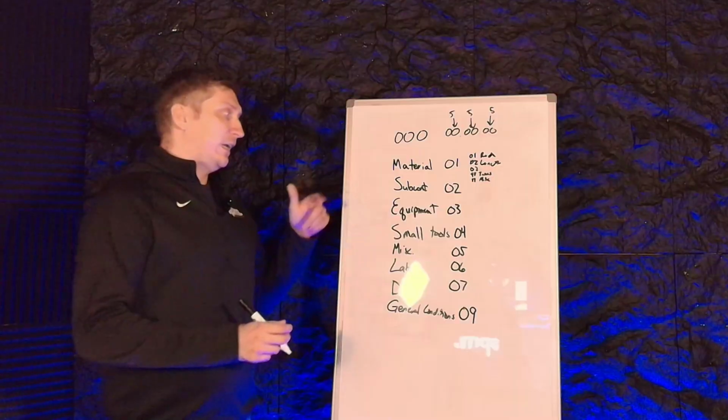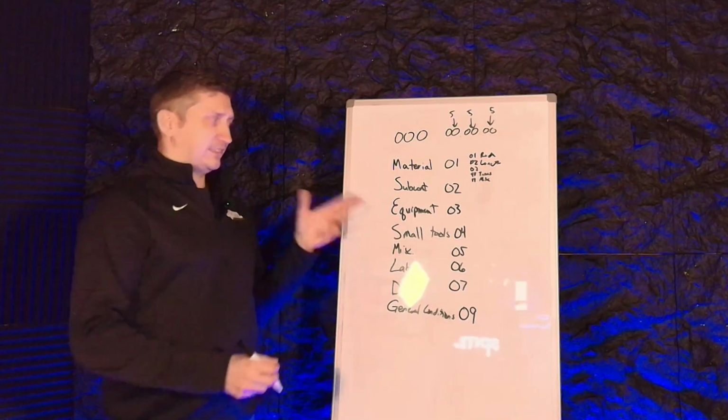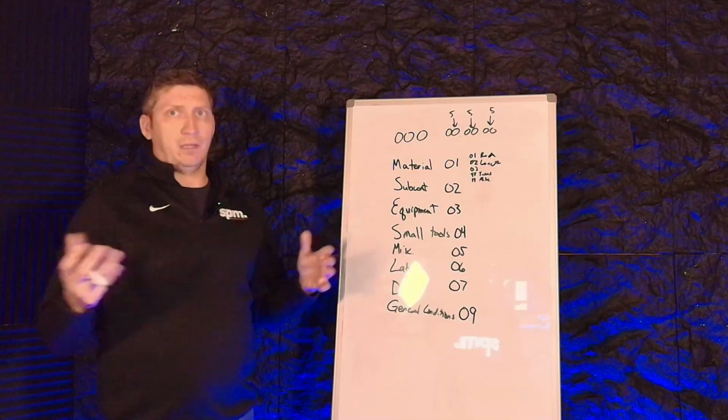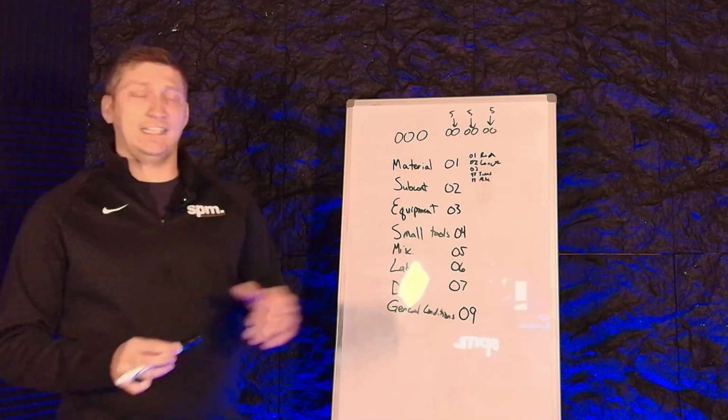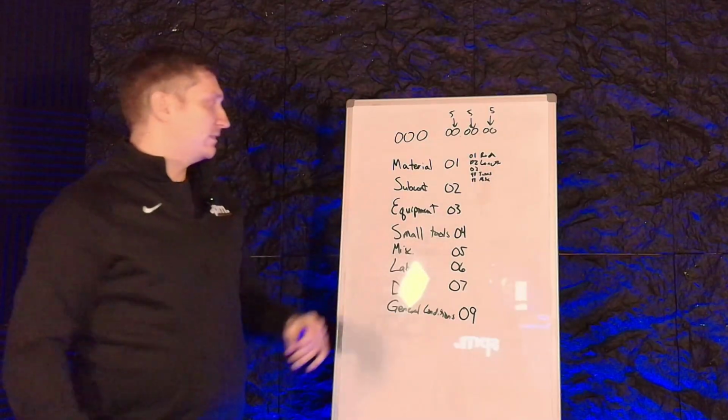But if I say, I had this piece of equipment, it was owned, it's an owned piece of equipment, so that's our 01 code, owned equipment. It was on this job for a month or for 4 days. I can say, hey, it's $48 a day to go on this job. And I have a bucket that I'm dwindling against.